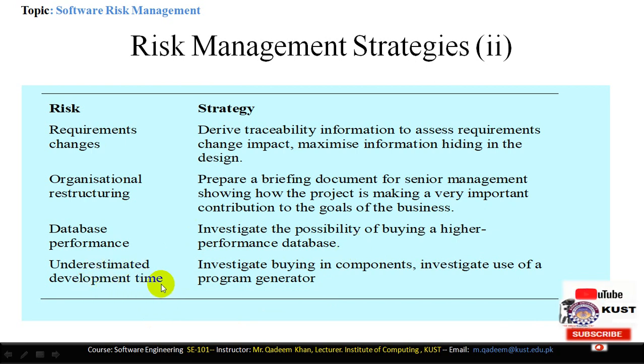Underestimated development time. If we have time issues and the time is underestimated, then we have to investigate buying in components and investigate the use of a program generator.